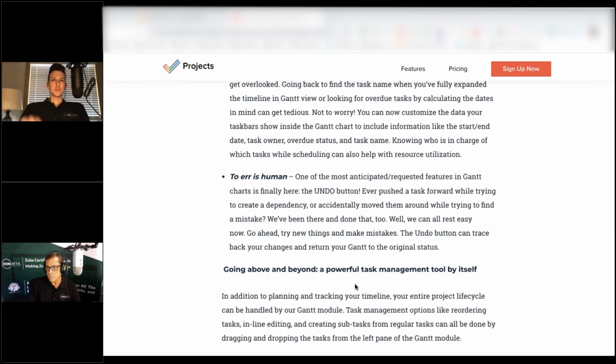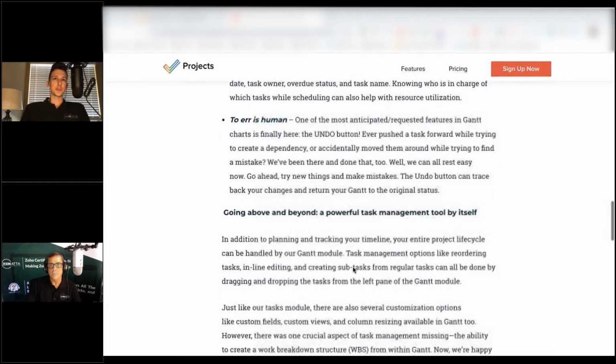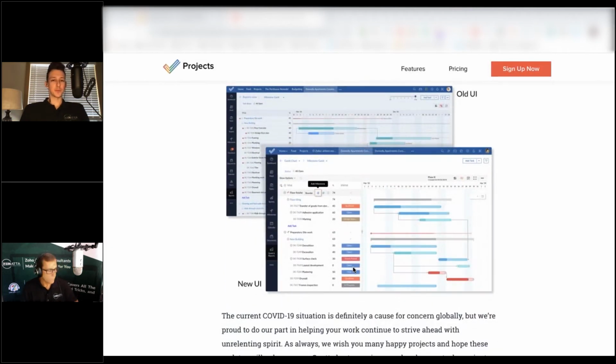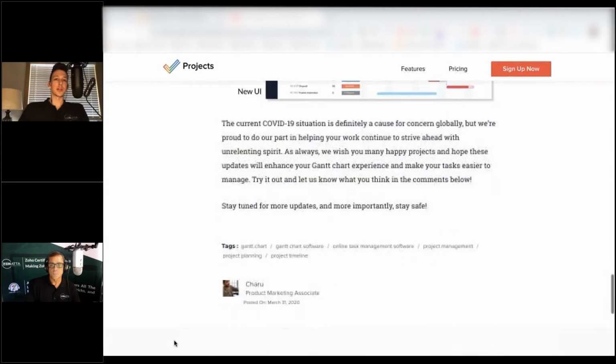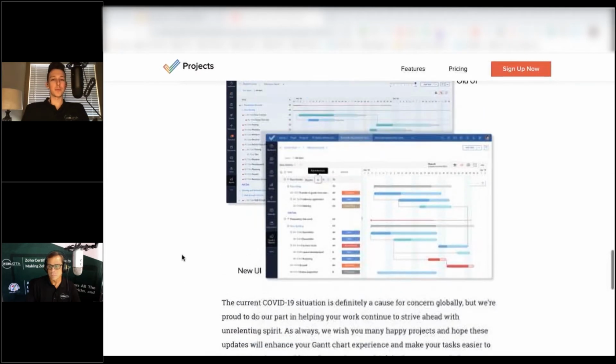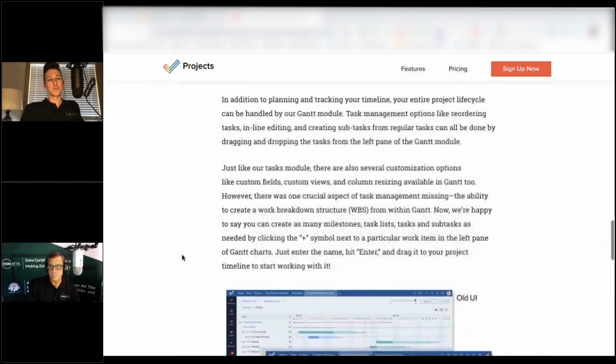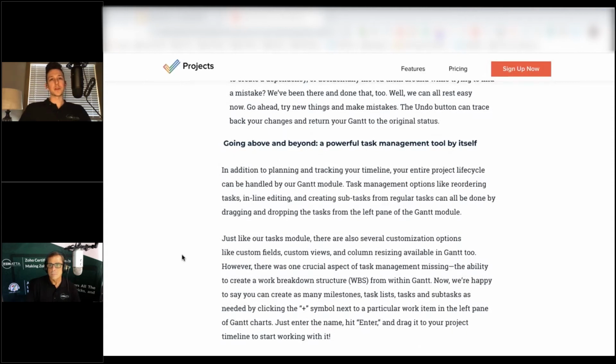Yeah, so inside of the Gantt charts, basically what they've added is first you're able to actually define a task on the Gantt chart that is unscheduled. Previously, if you didn't have a task with a start and end date, it couldn't show up anywhere on the Gantt chart interface. Now you can actually have it show up even if it isn't scheduled, which is nice because, of course, ideally you'd like to have everything scheduled in advance, but sometimes you may just not know exactly when you're going to start a certain component of a project. But you don't want it to not show up in the primary place that you're going to look at to manage project timelines, which is that Gantt chart. So it's definitely nice to be able to have those still show up here.